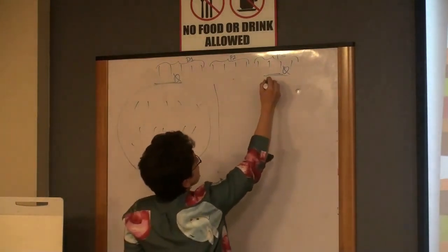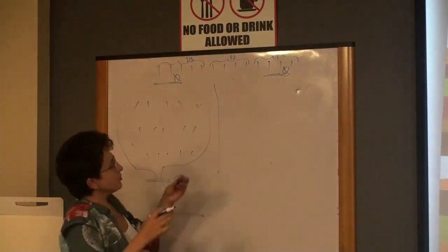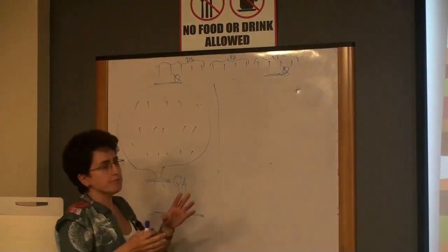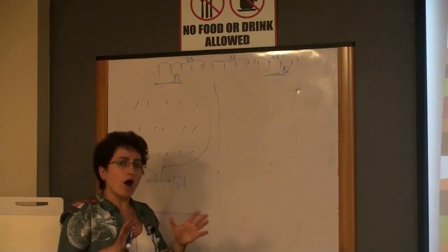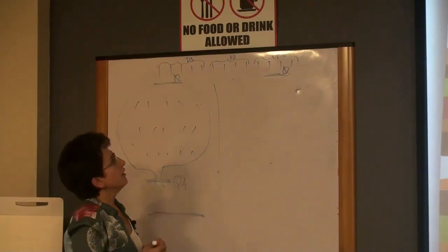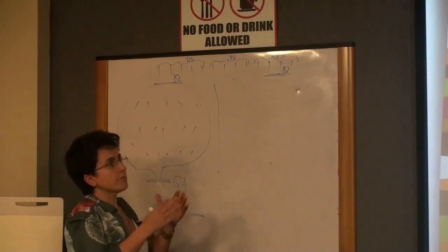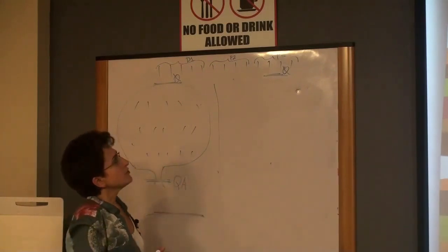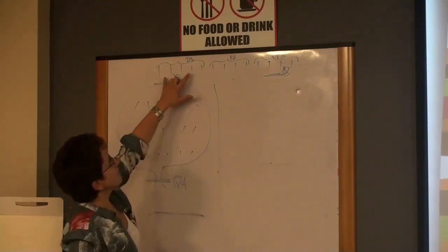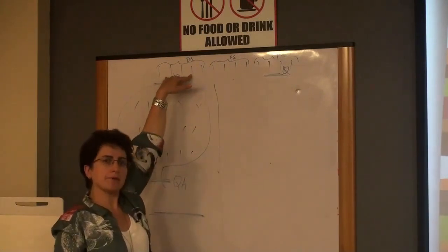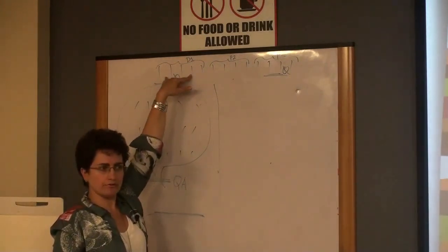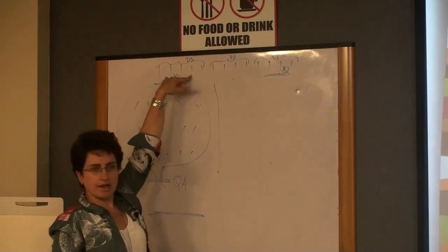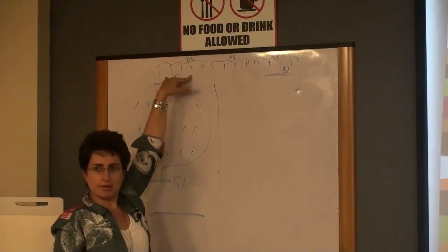And then what people do, they say, okay, we have a development team of 5 people and we know how much we can accomplish in a particular period of time. So let's try to develop these features first. The high priority features would go into the product first, and then let's test it and see whether it's functional.